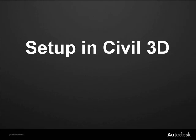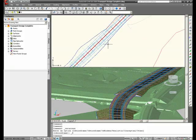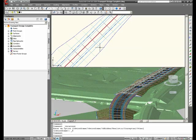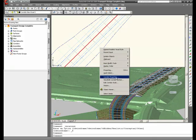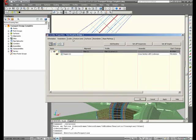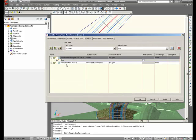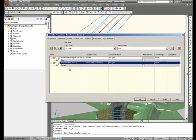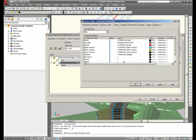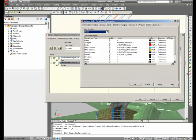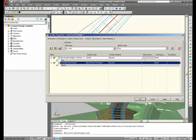Within Civil 3D we can now look at some settings to try and automate the link process. So for example here we have a corridor surface. We have got a formation or datum layer created. But within the style we can actually create a layer that has a similar name to the task. So we are looking at the model view and create that layer name similar to the task.